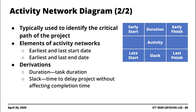Entities such as early start date, late start date, early finish, and late finish, including slack, would be derived values. The only inputs to the different activities are the duration and the activity name. As you read up online, you may find different conventions used to represent the various activities, but the convention used in these slides is as follows.